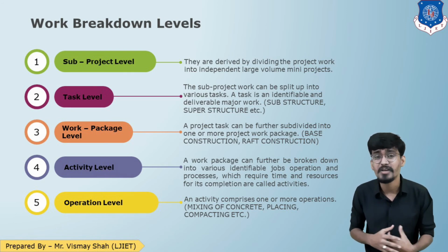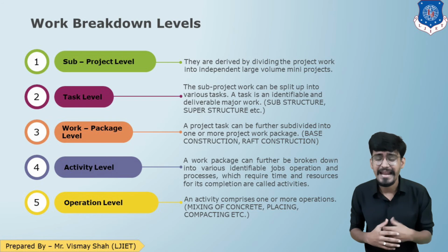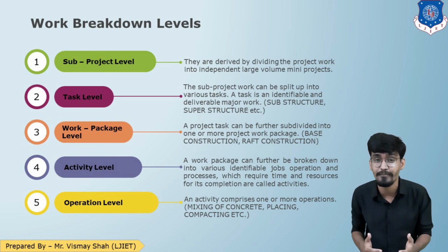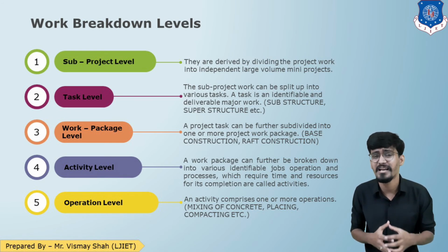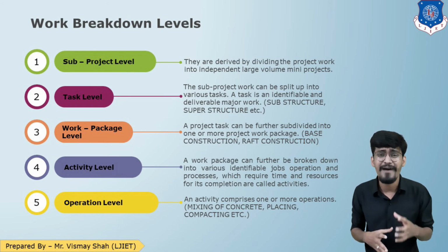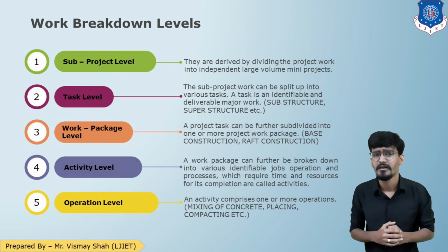And the last is operational level. In an activity, there are various things such as mixing of materials, transporting, placing, compacting. So these are known as operational level. So these are the 5 levels in which you can divide your entire project.